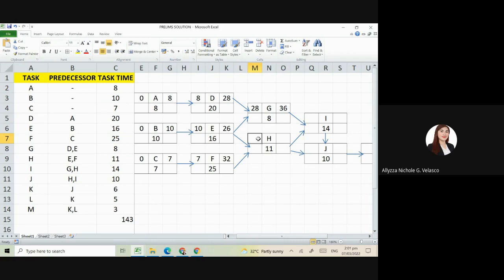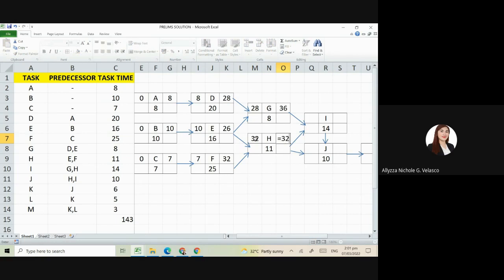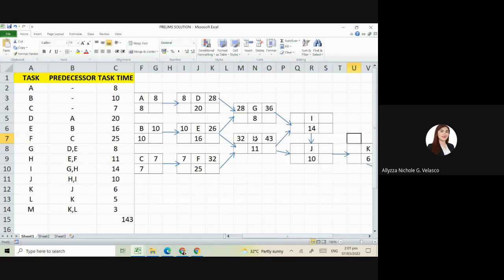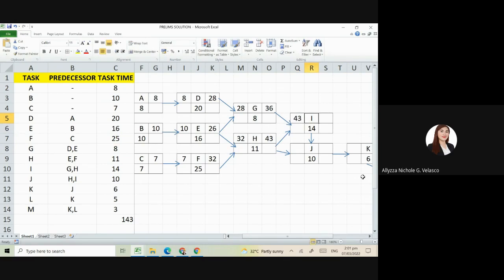Next is H. Its predecessors are G and F. So the higher one. So 32. We'll wait for F before we can start H. So that is 32 plus 11. Next is I, connected to G and H. The bigger one is H having 43. So 43 plus 14, that is 57.